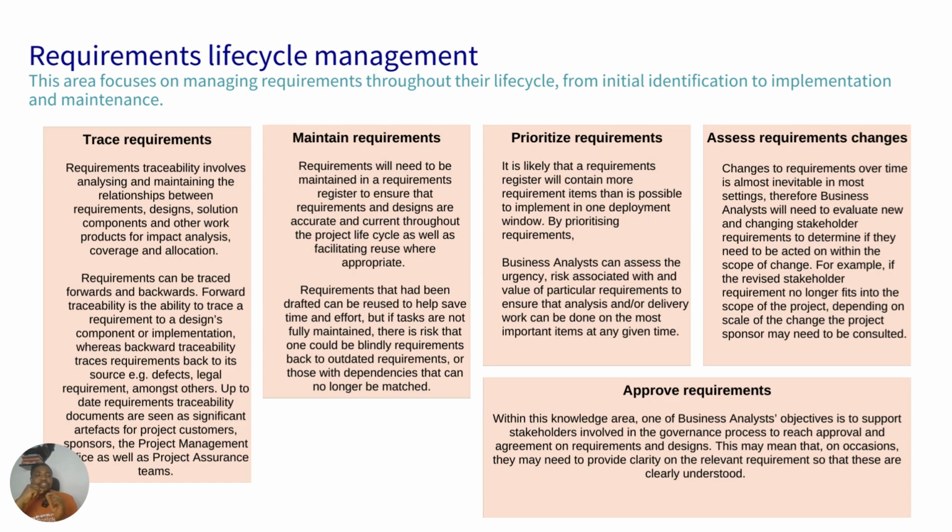As requirements keep coming in and we put them into the backlog, we then have to reprioritize to say, this new one that is coming in, how does it rank alongside the ones that existed before? Say we've gotten a requirement to build a feature that allows us to listen to music as we are working. I will check this requirement against the existing requirements in my backlog, based on the prioritization framework that I'm using. We'll also learn about prioritization in detail.